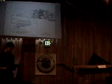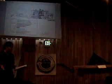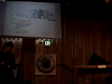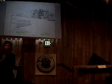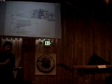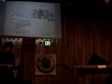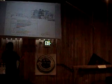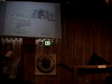And then the next step is kind of taking an online survey, and parts of it went to our mechanical engineer, parts of it went to our lighting engineers. The GC took a portion of it, talked about some of the things they would do on the site. And it's a 1,000-point survey. There's different sections, just like in LEED: project management, site, energy, water, materials and resources, emissions, and indoor environment.